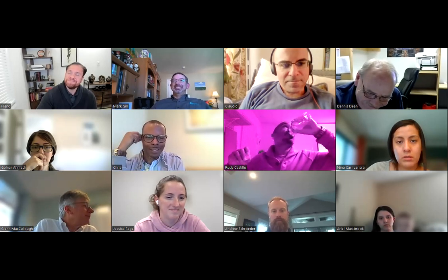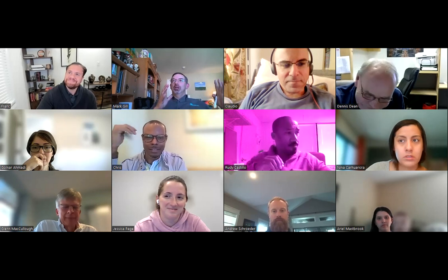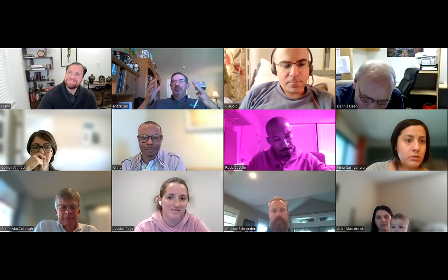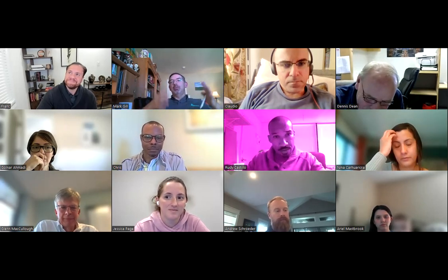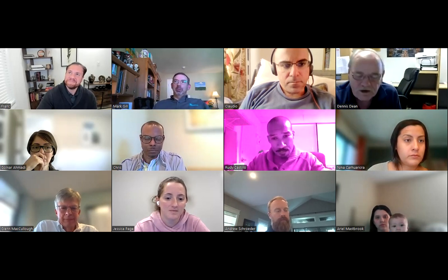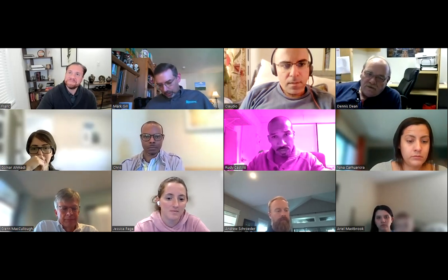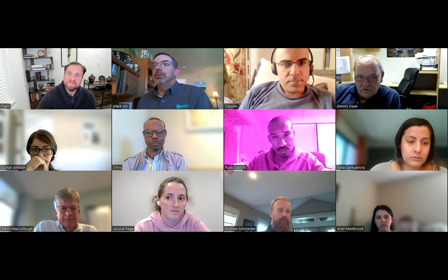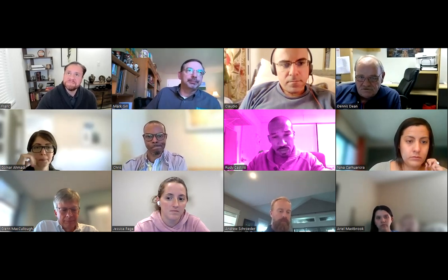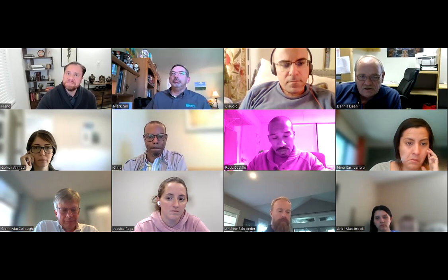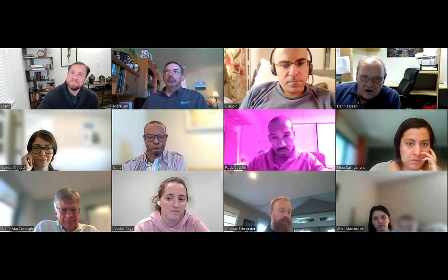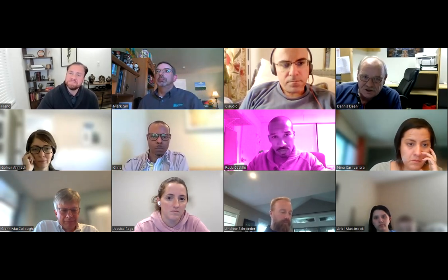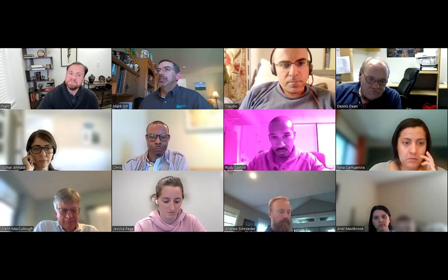Right, you would start a scope of work conversation. You would have the RFPs and then the changes, and all of that would add up to the contract that PD's working on, right? Exactly. Instead of reinventing contract language, you should just be able to take the main RFP report and that's your contract. That's your contract, short any other changes since then.